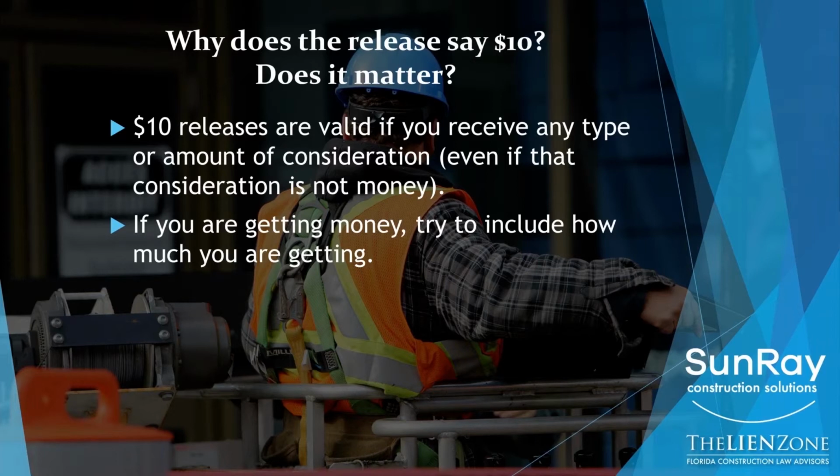It's going to say, we're going to pay you through, we're going to get a release from you because you issued a notice to owner. It'll cover a month of time, and it'll say $10 because I'm actually not giving you any money, but I still need a release from you. So that's a situation in which a $10 release is perfectly fine.